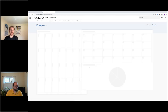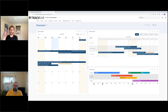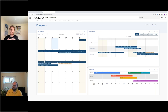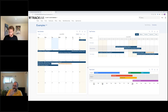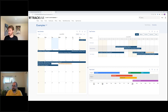Milestones are a really good option for Gantt rows. If you number your milestones — milestone one, milestone two, milestone three — and sort alphabetically, you'll get a nice waterfall where tasks move down in chronological order for the project.